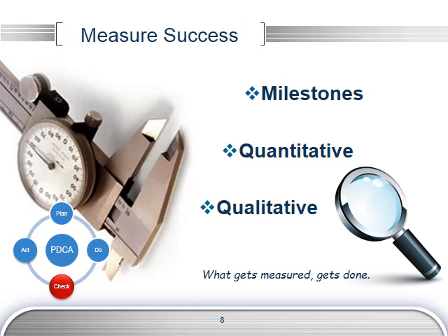So if I needed to put in place a project that reduced the number of bogus fire alarms, then I would probably measure the number of fire alarms and the number of fire alarms that are bogus. And I would look for a baseline, and then I would look for an adjusted number, and I would probably have some kind of goal set in there of what I expected to reduce it by.